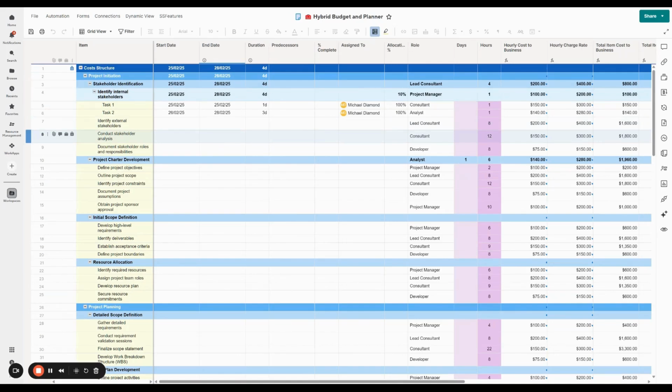And that's really typical, is that a piece of work might be estimated to be 10 hours of work. The project manager will allocate 16 hours to the person doing the work, and maybe they only need 8 hours. And so what Smartsheet's able to do is give you that visibility between what you estimated, what you planned, and what you actually did.